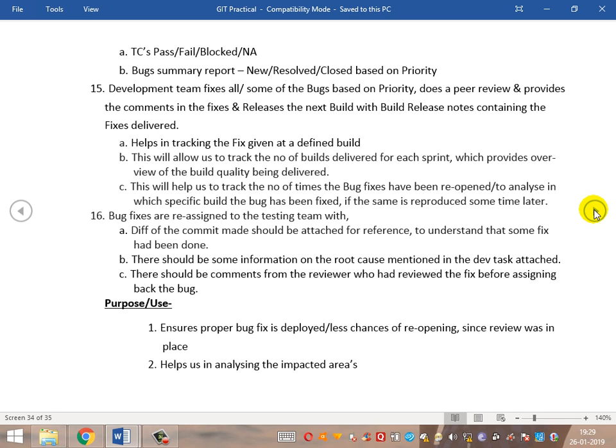This allows tracking the number of builds. The release mails are very important — they help in tracking the number of builds released for each and every sprint. This creates transparency of the build quality being delivered in each sprint. If the number of builds keeps increasing, it implies the build quality or delivery to QA was very poor. Conversely, the lower the number of builds deployed, the higher the quality of delivery.